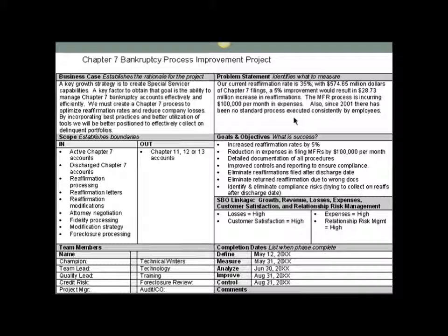But here's an example of a project charter which lists the business case. And again, business case is really what it does is take this problem statement plus the goal of an objective, and it puts them in a nice business case. So think about that. So taking this category plus this category and putting it in a business case. So what I suggest is you start with the problem statement, of course, your number one, start, and then work your way to the goals and objectives. Make sure you use the concept SMART. Smart, specific, measurable, attainable, realistic, and timely as you build these goals and objectives.